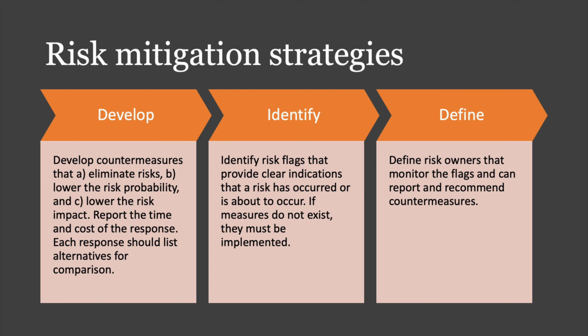We also monitor everything, so we receive reports that a particular flag has been identified from the risk owner, and these are things we'd evaluate in this phase. And then we also get the reporting in, right? So when a flag is detected, the owner will inform us, and also anybody else that's impacted by this, depending on how you've laid out the procedures, or the protocols, for when this occurs.